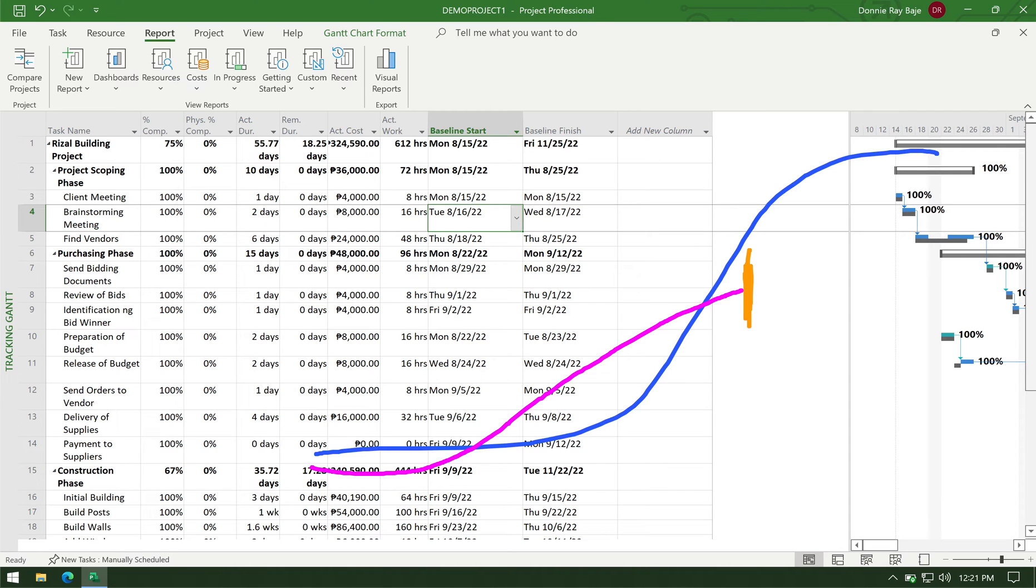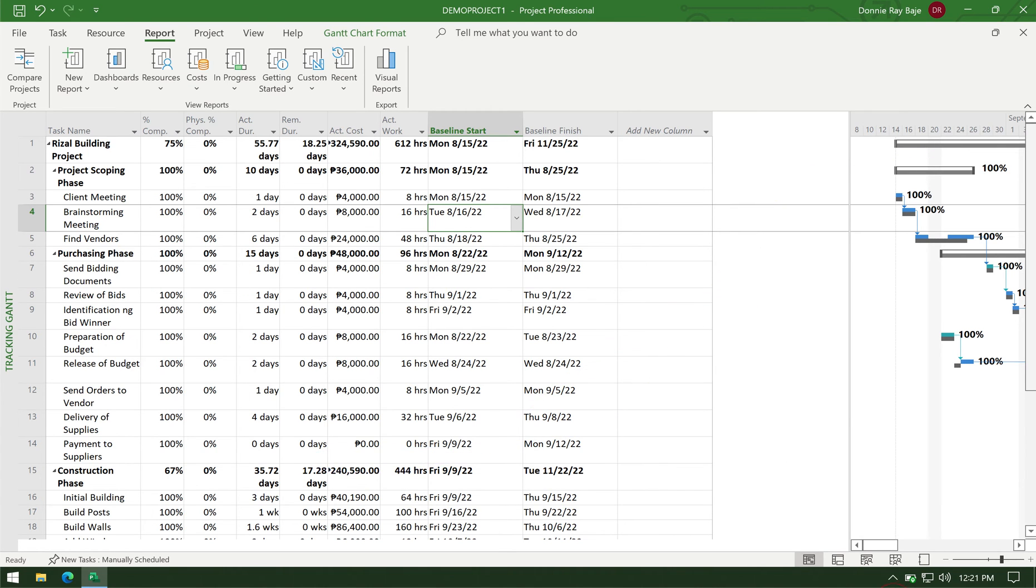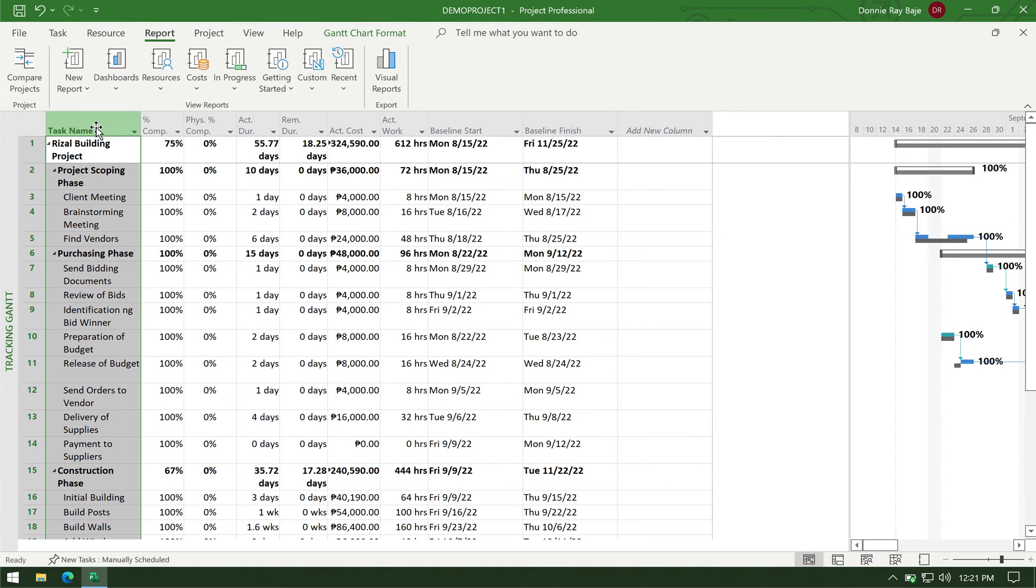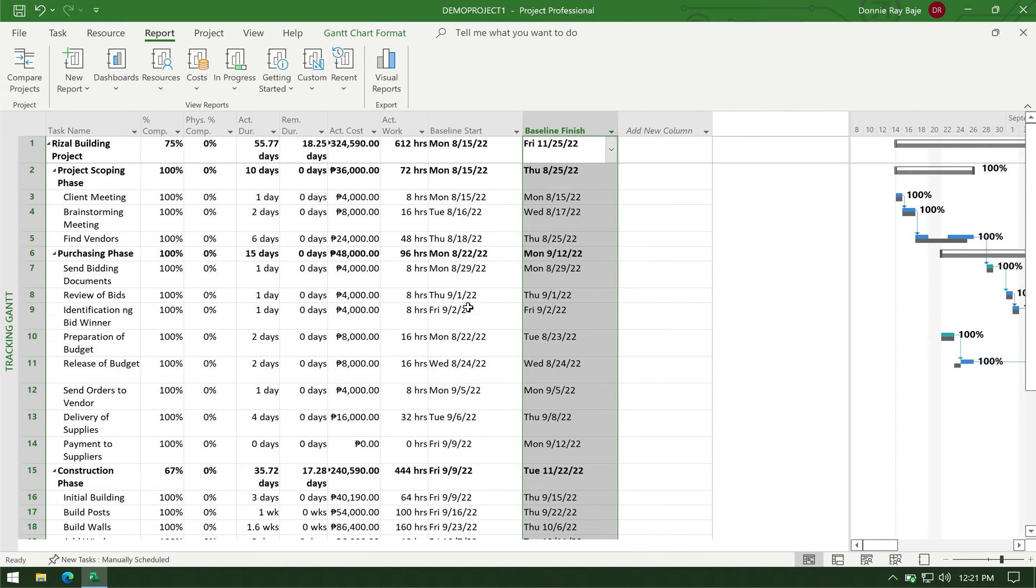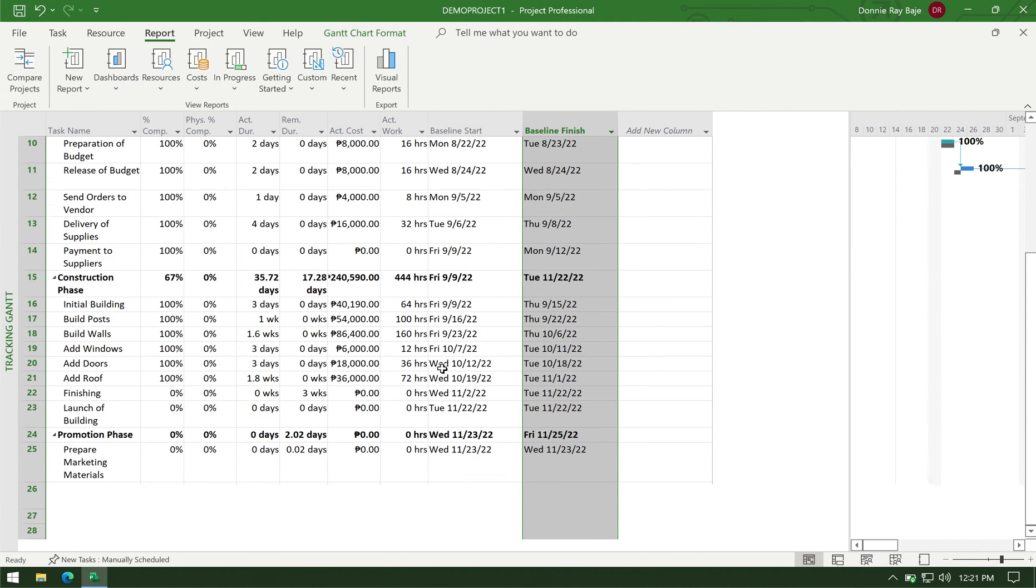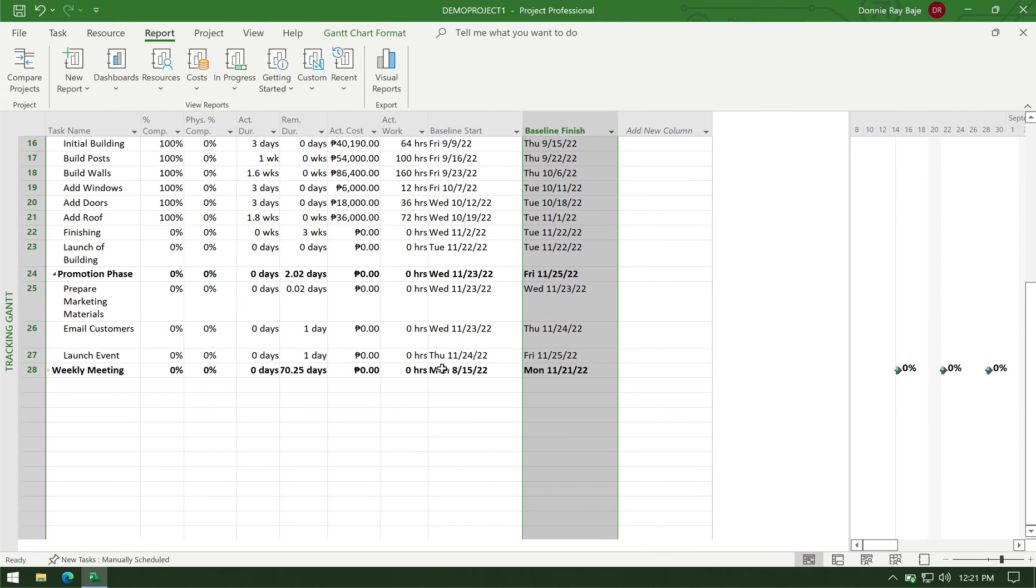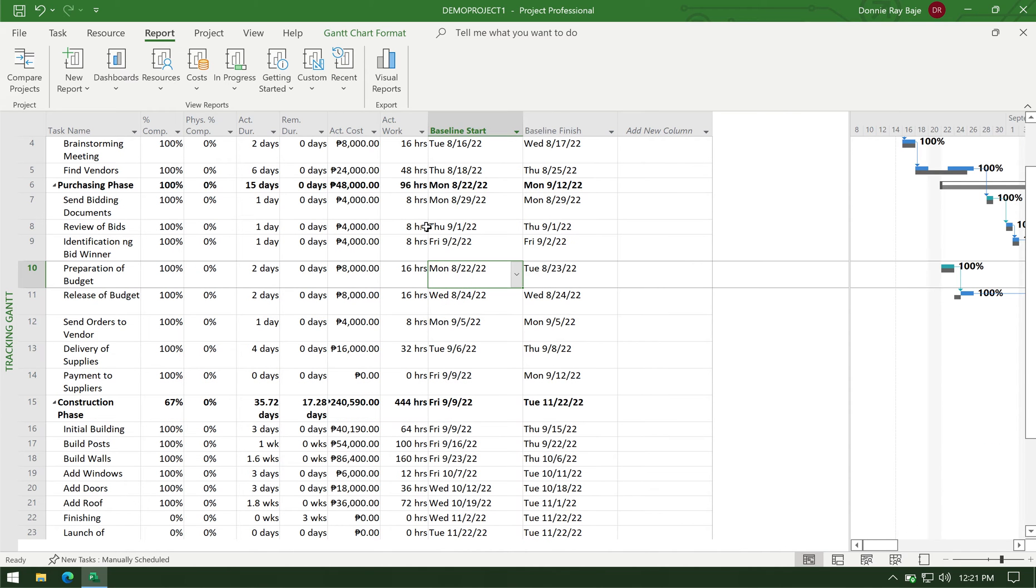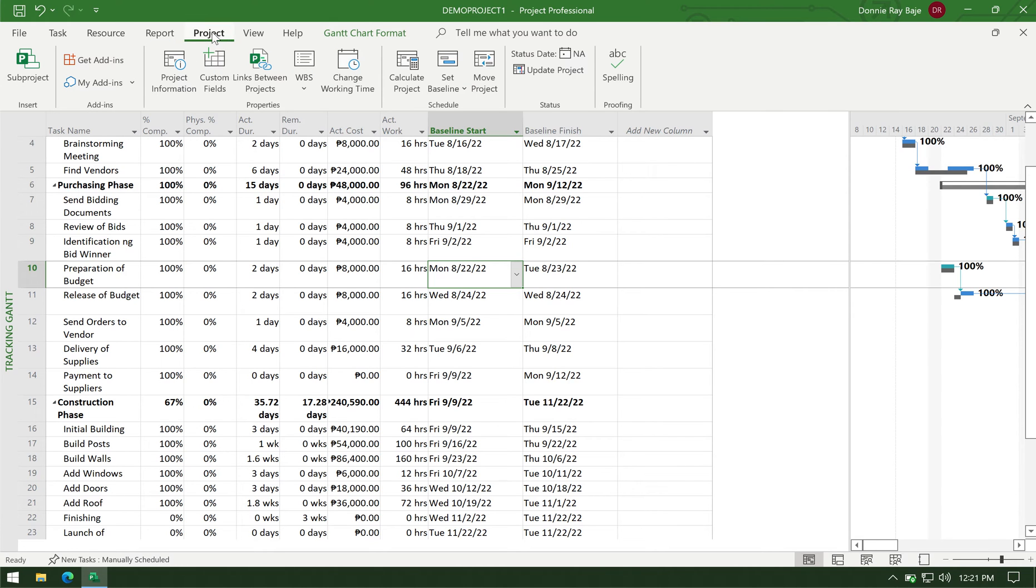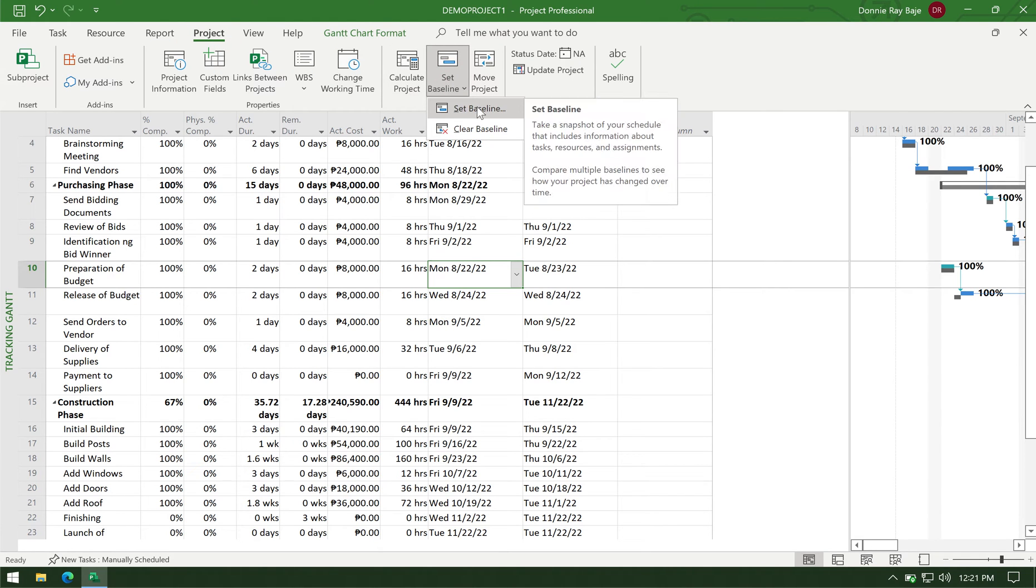So to start, you have to make sure that you entered your data in MS Project correctly. After you put in the tasks in your Gantt chart, you have to put in your start date and end date which are your targets for the specific tasks. One important thing to do after you've entered all the start dates and the end dates is that you declare them as a baseline.